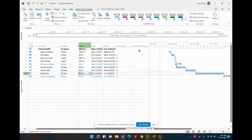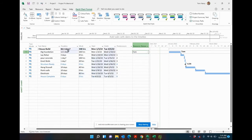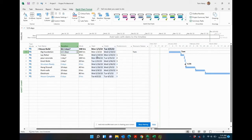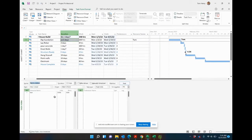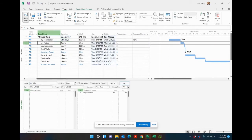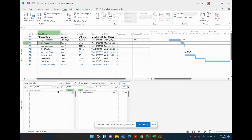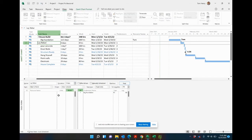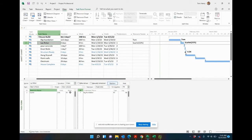When we start now adding resources to these tasks, you can see how it's now calculating and adjusting for me. If you really want to get it a little bit more granular on this, what you can actually do is come to the view ribbon and check details. This is actually called the task form where we can see for a given task what's going on. So it's three days, we can see how much work is going on for this particular task, lay the rebar. Now what we have to do is actually assign a resource in here. Put Scarlet on that one. That's okay. See how the work is calculated now because it's a three-day task.